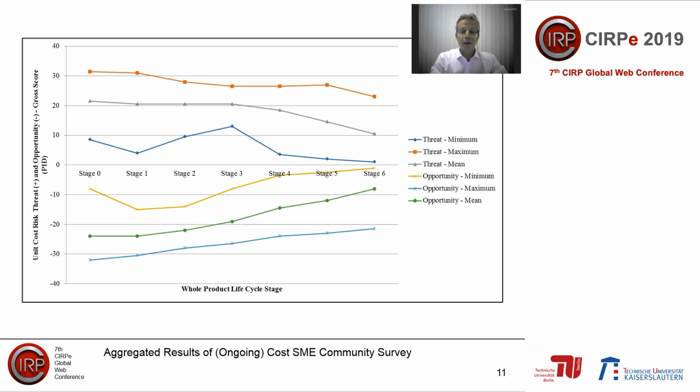The key insight is that although the uncertainty funnel model is widely propagated and influences decision-making, the actual perception of stakeholders is a very different one. A decrease in uncertainty over the course of a project is acknowledged. However, the degree of that decrease is significantly smaller than the funnel model suggests, while fluctuations are expected, especially around stage 3, where the first pilots and first series models are actually used in practice. This is of course common knowledge to a great degree. The moment a concept is actually trialed or used, the experiences seldom fully match expectations.